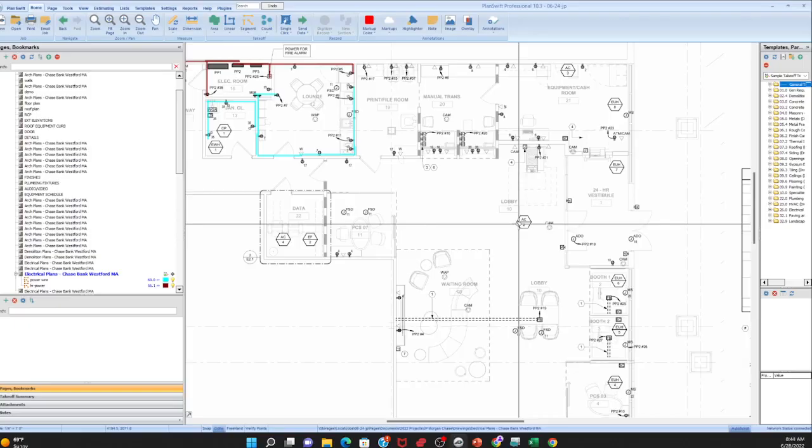So the first step in making sure you have everything you need is to get these counts done for the lighting, especially all the lighting and the lighting controls, and then send them the e-plans. You don't have to send them for the outlets and stuff like that, because they'll give you a package for the switch gear, the breakers and the disconnect switch. That'll be one thing, and then you'll get one other price just for the lighting and the controls.